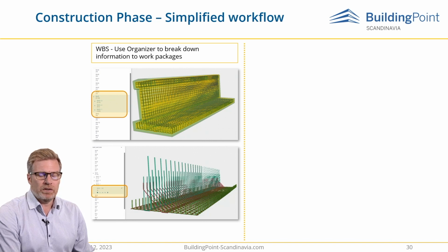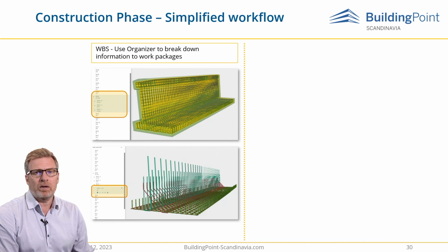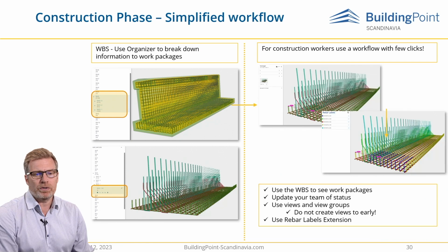So what we are actually working on in the field is taking that model that's been broken down, and we have a discussion with the field workers, in this case the rebar workers, about how we want to break it down even further so it's understandable for the field workers. That ended up in a product for how to visualize this for the rebar workers, so just how to present this in a way that is understandable.